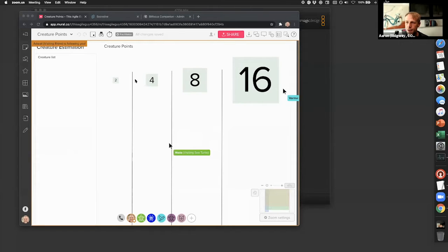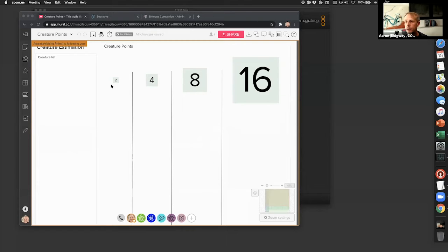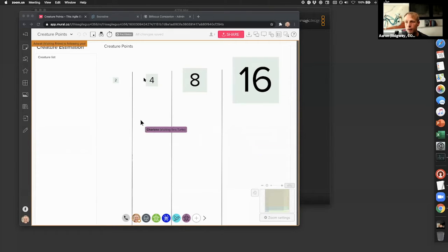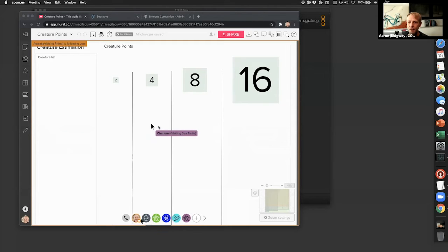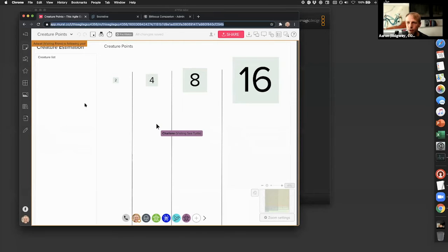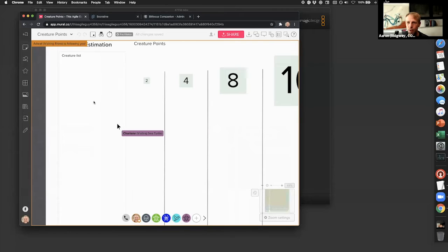We have a simple exponential scale. These sticky notes are approximately the size of the number on them. The four sticky, twice as big as the two, and so on. We're going to try to relatively estimate some creatures, but if you look over at the creature list, it's blank.